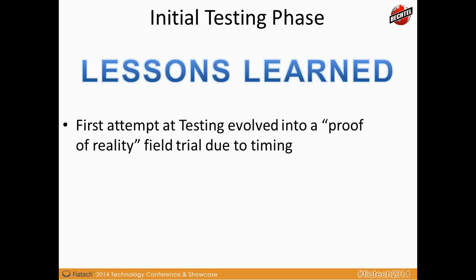We realized that perhaps taking a more iterative view, more small steps and solving small problems linked directly to what the field guys are actually asking for, would have put us in the right direction a lot quicker and lowered the overall barriers to entry. That's why we've come up with this nickname of proof of reality, because we designed and defined all this in a home office environment, and then took it to the field. And that field trial ended up being a proof of reality because the people that were going to be the ultimate benefactors of this were not really included in the design process.